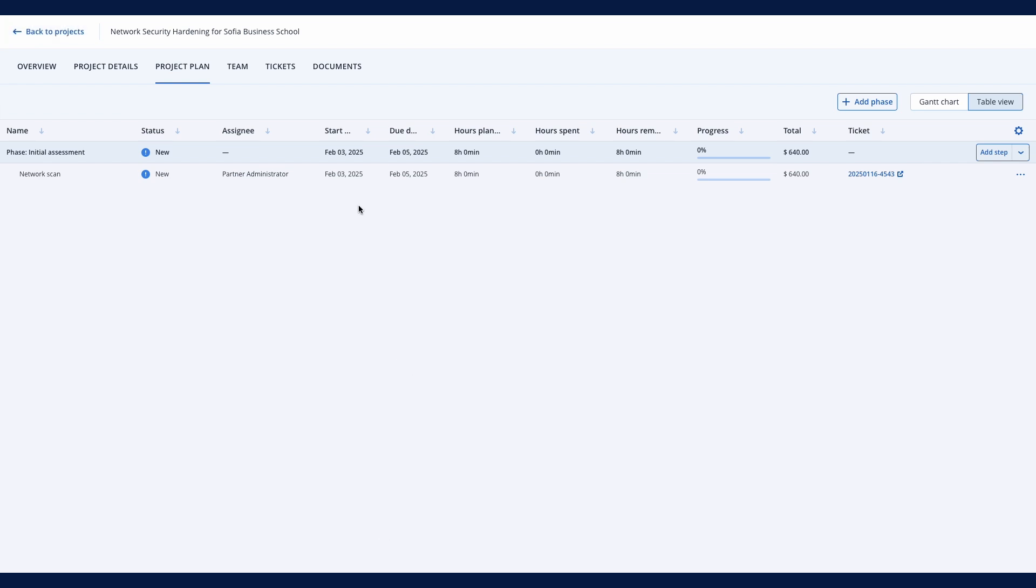When you save a project step, it automatically creates a project ticket for your technician with all the necessary details, including the name, description, dates, and allocated time. This ticket will also appear in the schedule and can optionally synchronize with your technician's Outlook calendar.